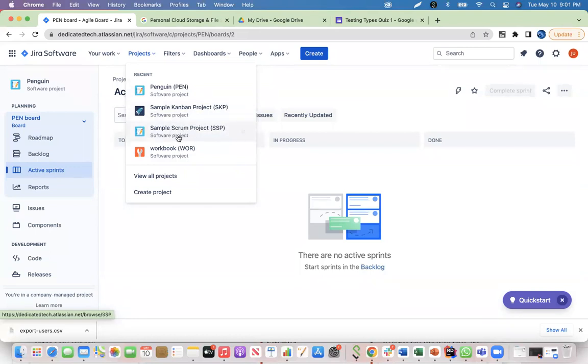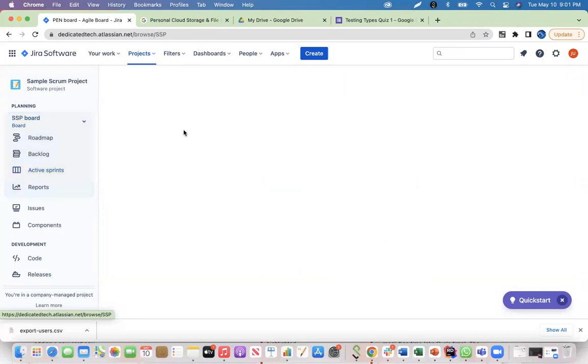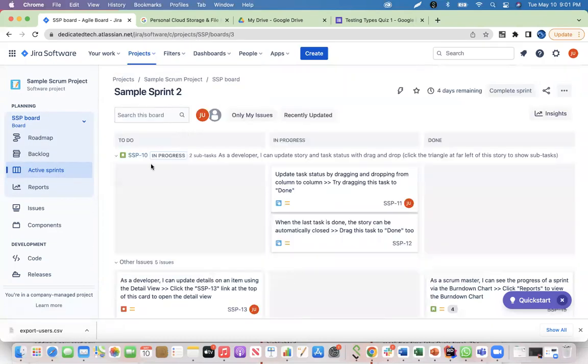Scrum is basically iterative with 2 weeks or 3 weeks, whatever the time frame is, we have a sprint. Kanban doesn't have the sprint. Everything else Agile offers is there, except for the duration. There is no duration. If I did something today, it'll be deployed today, it'll be delivered to the customer today. So we'll go into that specific project, but first let's look at the Scrum board.